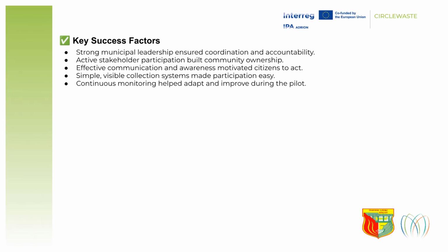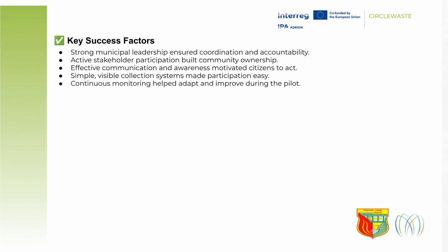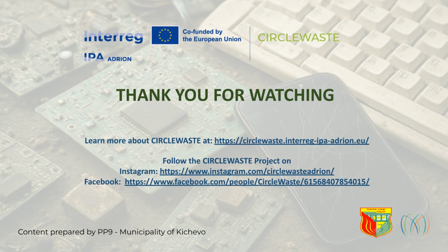Outcomes from the Kicevo pilot include installing 5 new collection points, collecting significant volumes of e-waste, reaching hundreds of citizens, and building a foundation for long-term management. Key takeaways emphasize careful preparation, the importance of coordination and communication, visibility for participation, and documentation for replication. Monitoring and evaluation are essential to measure progress and impact.